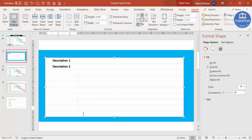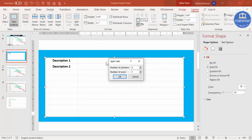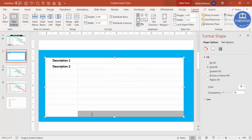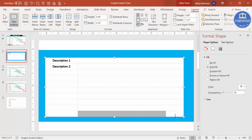Now I want to add months from January to December in the second column, but there's only one cell. To fix this, select the last row's second column cell, go to Layout, and click Split Cell. It will ask how many columns — enter 12 columns, keep rows as one, and click OK. You can see it has created 12 columns.